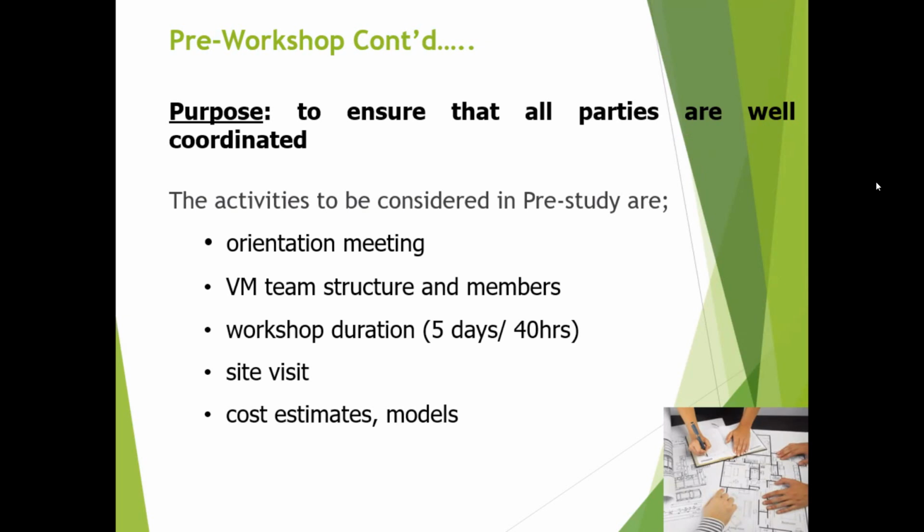Then the activities to be considered in the pre-study: orientation meeting. So they get together, and the team structure, members, right? And workshop duration, site visit, cost estimate, models. These are some of the things we can come up with during the pre-workshop, right?